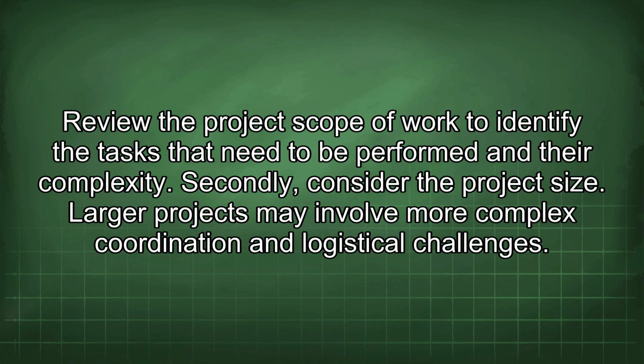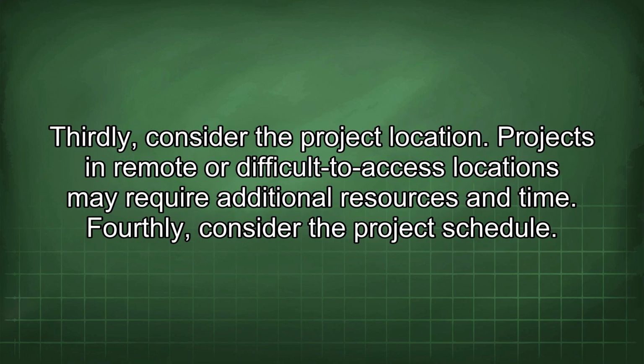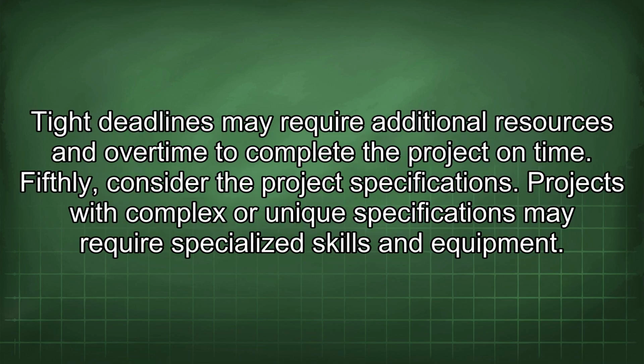Secondly, consider the project size. Larger projects may involve more complex coordination and logistical challenges. Thirdly, consider the project location. Projects in remote or difficult to access locations may require additional resources and time. Fourthly, consider the project schedule. Tight deadlines may require additional resources and overtime to complete the project on time.